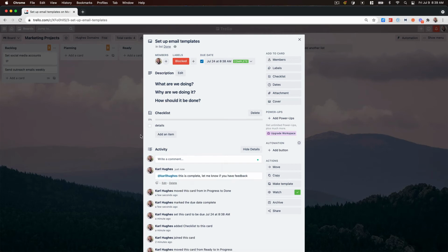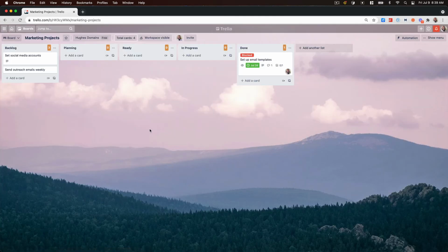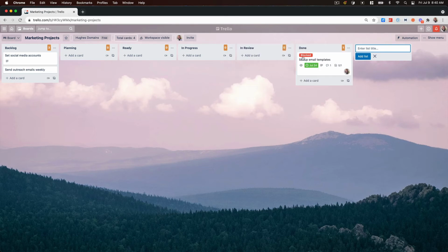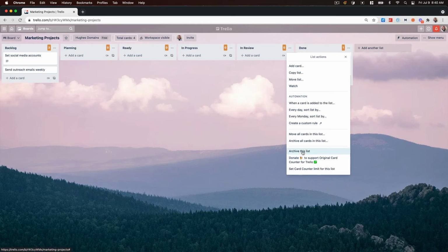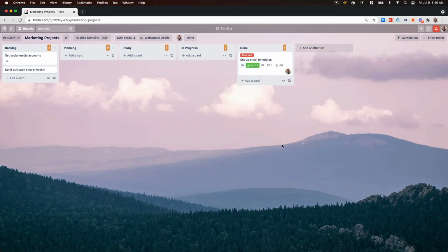Now, in a more complex project, one thing you can do, and I've done in the past, is after in progress, I'll have an in review column, so we can look at what that would look like. And instead of moving things directly to done, you would move things to in review, and then the reviewer would move it into done. I think that's good when you have a larger team and you have multiple stakeholders who review things. We do this a lot with engineering projects, but with some kinds of projects like marketing things, a lot of times we're not ending up doing something that granular. So we'll remove that for now. But that's a good option, something else you can do to help smooth out your project management workflow.